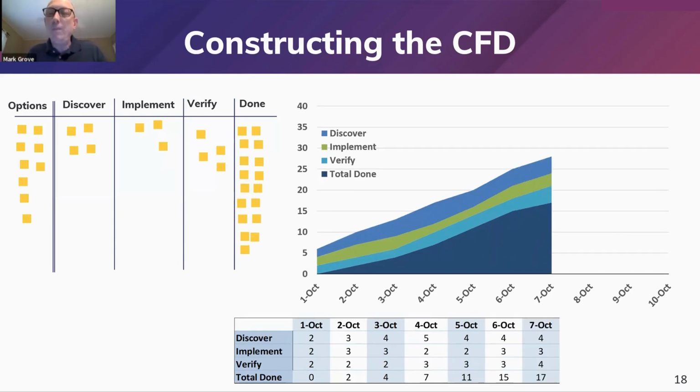One thing to keep in mind, though, is to always question, always be curious about what the snapshot is, because it could be the case that even though the dates down below say October 1, October 2, October 3, I'm taking a snapshot twice a day, and I'm just not labeling it as such. So one thing you want to be aware of when you look at that x-axis is maybe go back to the team, if you're brought in as a consultant, and ask how often are you taking these snapshots? Just something to think about as you're doing this.